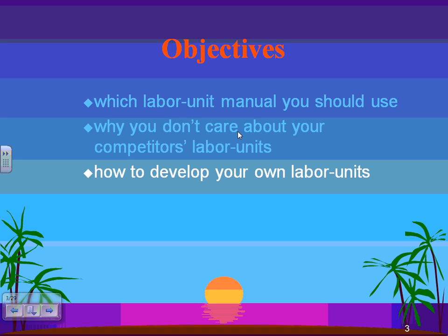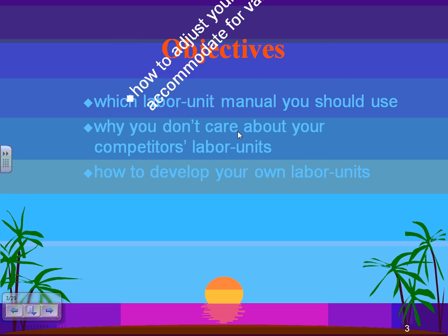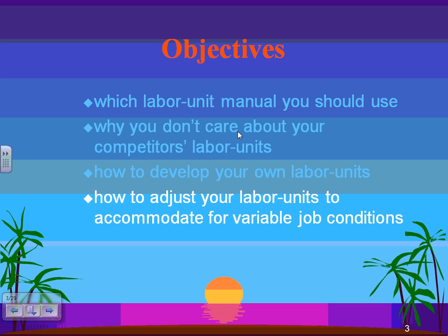Here in Minneapolis, guys, or in the States, there are two sets of labor units. One set is NECA. I'm going to show you the NECA labor units that a lot of people use as a platform and modify for their own projects. The other is other companies develop their own labor units and add a price to it. But the most common one, at least in our state, among the union shops is the NECA ones.